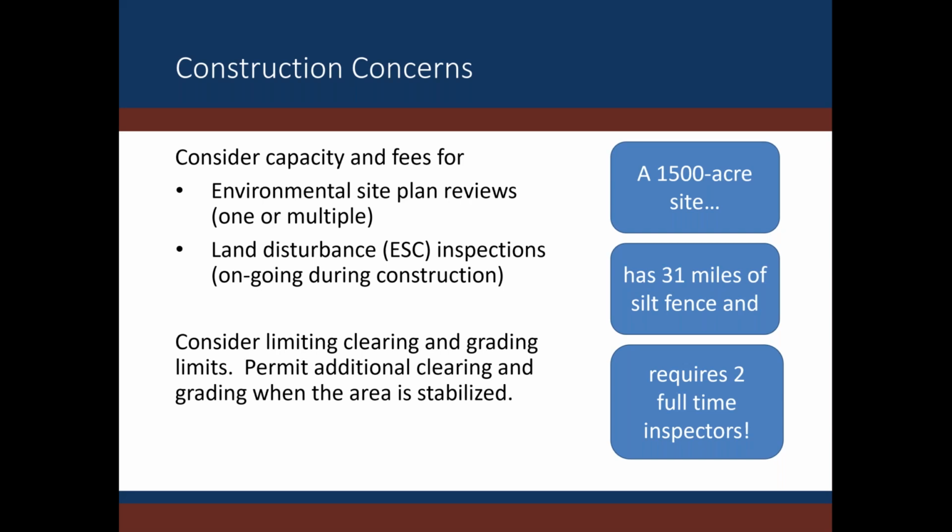We've also seen the local government ask the applicant to pay for an independent contractor to complete all required site inspections during construction. In addition, consideration should be given to limiting the total amount of clearing and grading that occurs on a site at one time. It's highly recommended to do this in stages, starting one section after the first section has been stabilized.